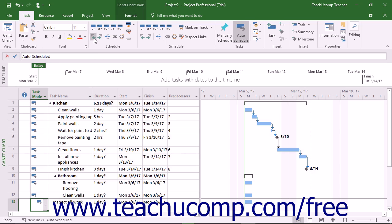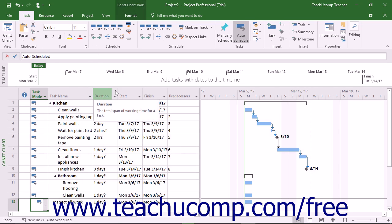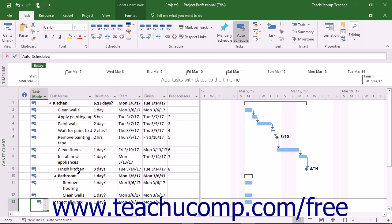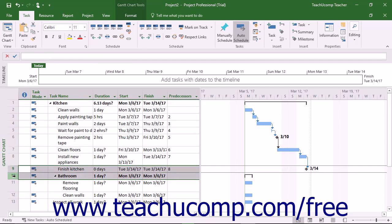You can also link summary tasks together to note sequential phases in a larger project, if desired. You can also link the start of a summary task to the completion of the last subtask in the previous phase, if preferred.